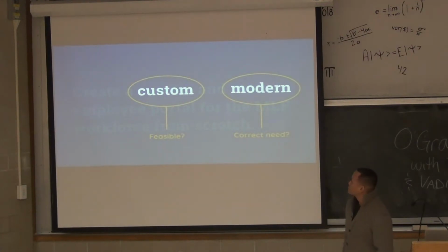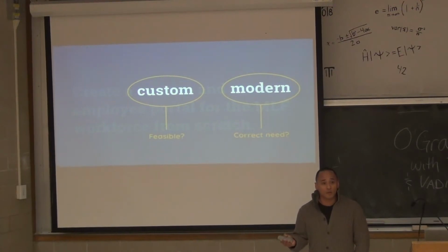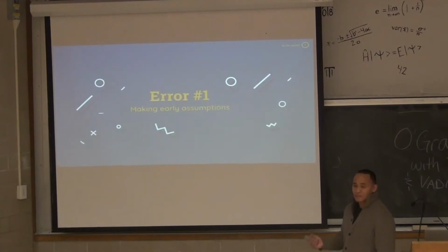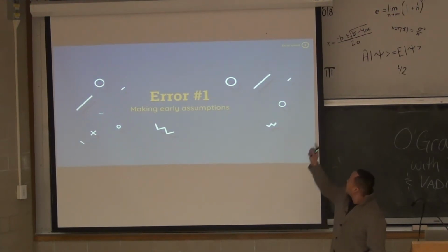Custom and modern. Is custom even feasible from a technical perspective? Knowing the platform that the client uses, can we even do custom? Modern. Is that the need that the user wants? We don't even know. Even starting the project, we don't even know what modern is. What does modern even mean? It's very subjective, right? So this comes up to our first error, making assumptions early. You never want to do that within at least an intranet project. And we have a little counter at the top right there. This will be our first error of the night.